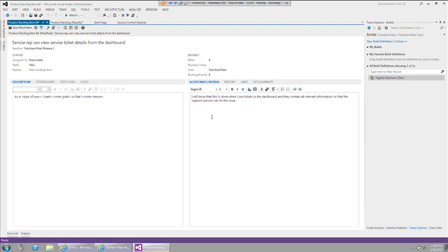As I create the acceptance criteria from the product owner perspective, those might be rendered by test cases. So you have two types of validating this. As I do the user acceptance in the sprint review meeting, I will be looking at the acceptance criteria on each of those product backlog items and asking, do we validate, is this valid? Is this what we wanted to show? Now, you can also create test cases and attach them to the product backlog items so that they can be automated. The best practice is that we take the acceptance criteria and change them into test cases, and then have them be part of a list of tests that will be run with every build.